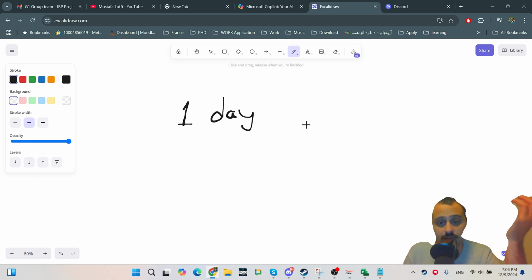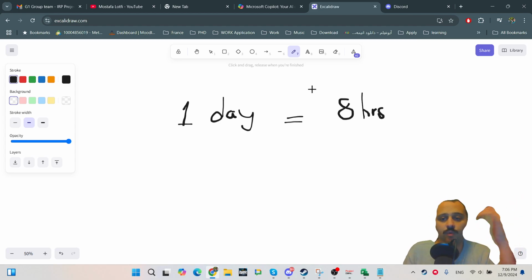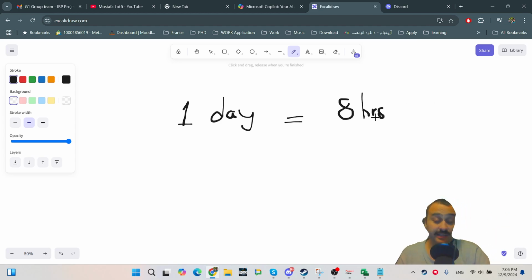On the duration field, whatever value you put, that's the concept, it seems, for ProjectLibre. Whatever you put in the duration, ProjectLibre is trying to convert it to the day and consider the working hours of that day.